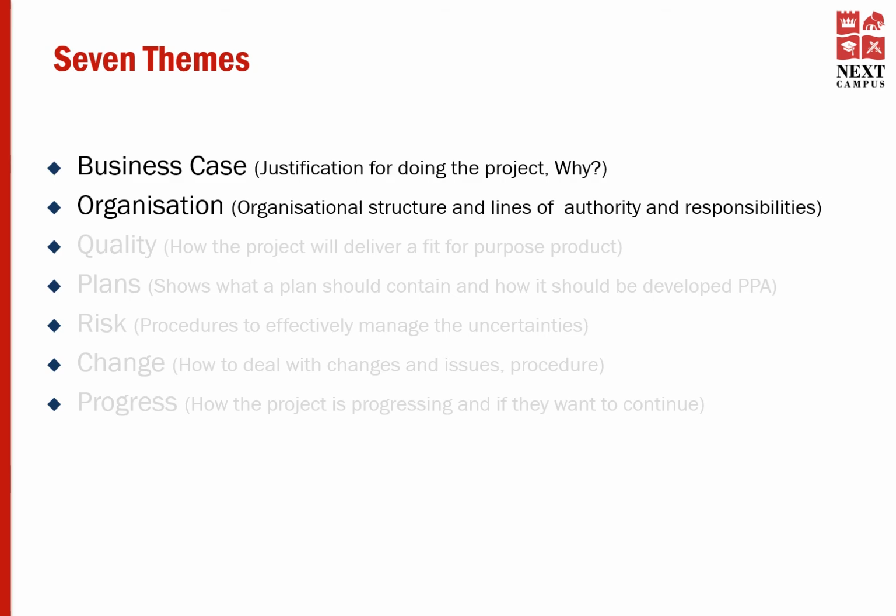A PRINCE2 project is based on a customer or supplier environment. One party is the customer who will specify the result and most likely pay for the project. The other party is the supplier who will provide the resources, do the work and deliver the project.